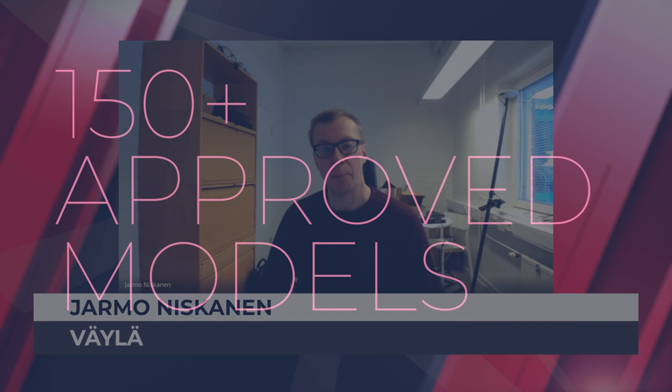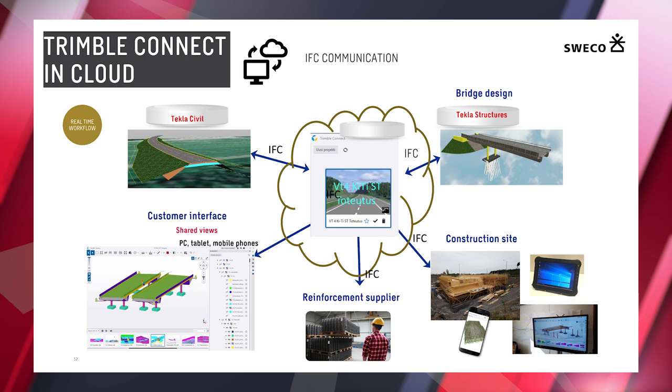And how many models has Väylä, the Finnish Transport Agency, approved with this method, just based on models? In this project, over 50, and we have used it in other projects too these days. So I think over 100 bridge models have been approved with this method. How did you make remarks during the design stage when dealing with the designer? Did you use Trimble Connect or any other tool? Mostly we used memos and the project portal to share those memos. But in some cases, if we could, we used marks on the models too, though mostly memos.